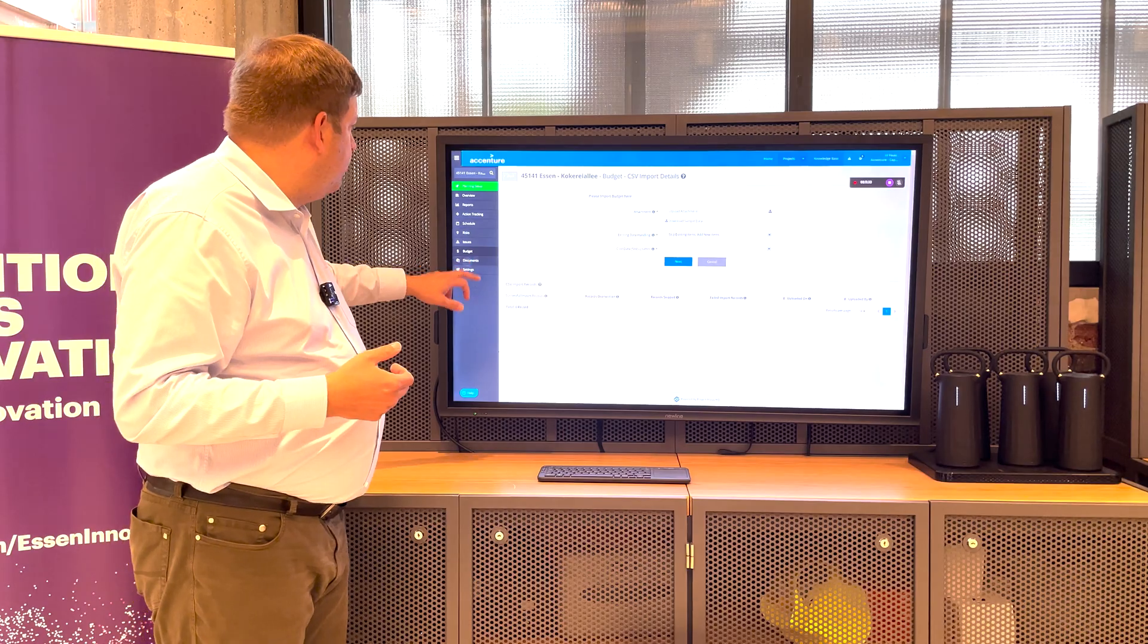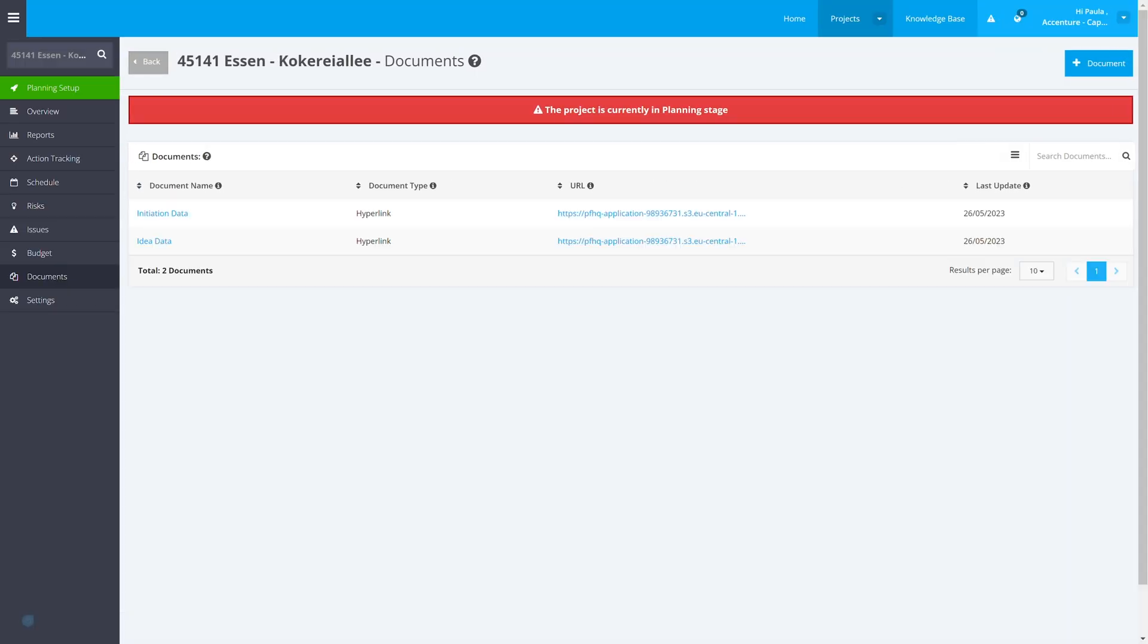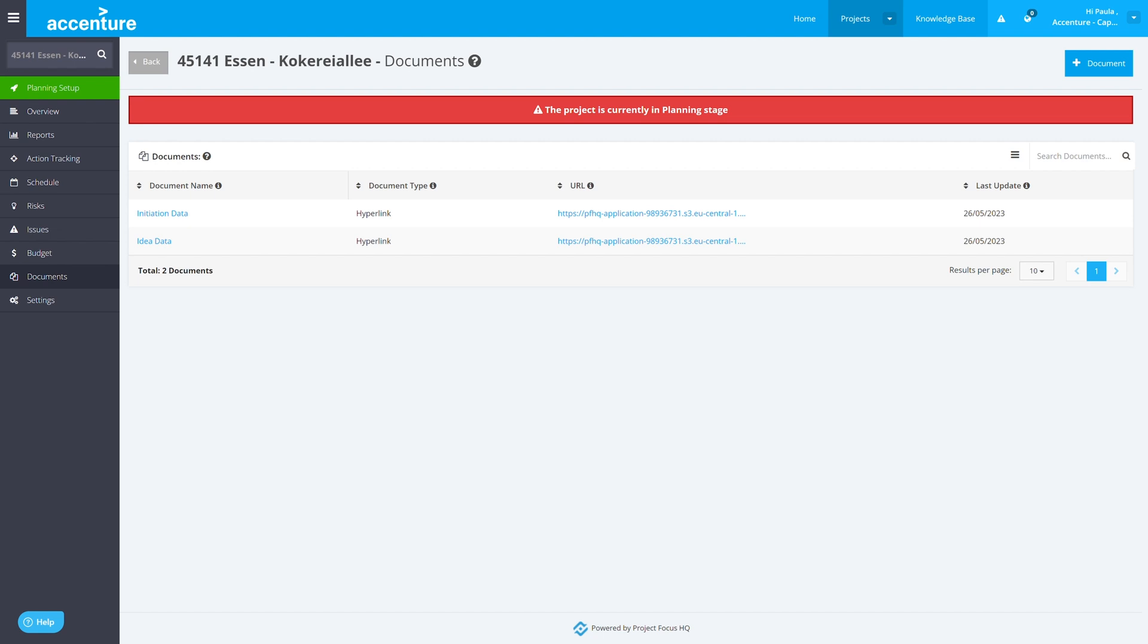And so, the last thing is, of course, documents you can define in the beginning. This is really primitive here in that example, but you can define deliverables. I need, for example, a planning document ready by that date. I can link it with my schedule. I can assign it to the people and I can also assign budgets to it.